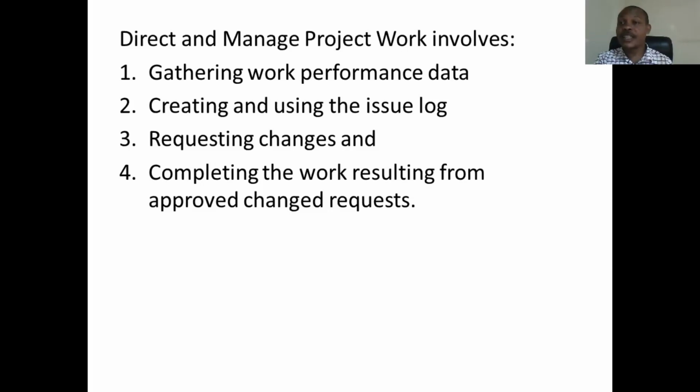And if the change was not approved, he will still go back to the person requesting the change and, with possible reasons why the change cannot be approved, let him know and also document it. So it's full of documentation. In predictive project management methodology, it's a process filled with documentation.